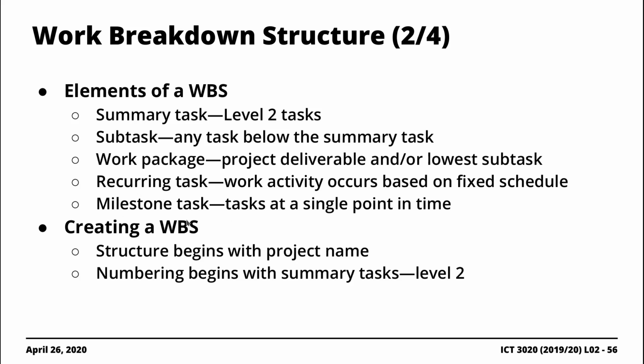Right? So creation of a WBS is quite simple. You first of all start at the top level with the project name, and then you start identifying the key high-level summary tasks associated with the project, and then you derive the subtasks associated with the different summary tasks.